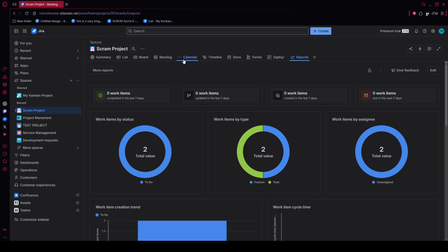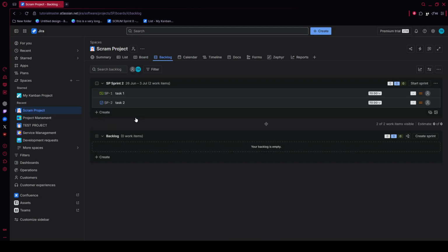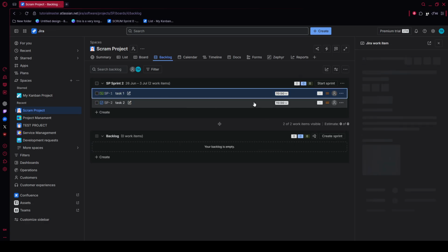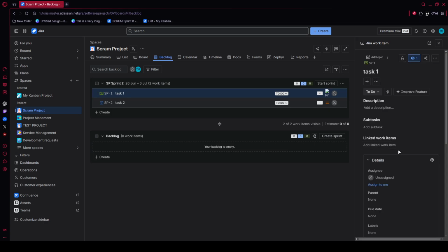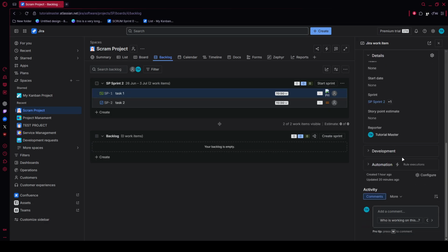Now invite the team to contribute directly on the shared page. Ask everyone to add notes into the standard reflection columns: what went well, what could have gone better, and actions. Keeping feedback organized this way makes it easier to spot patterns, separate wins from blockers, and move naturally toward improvement ideas.